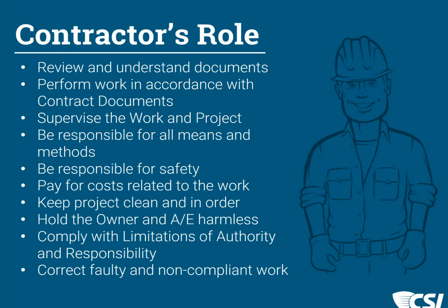And they are responsible for all the means and methods to implement the work, solely responsible for the sequences, the techniques, the procedures, and should they omit anything during that process, then they are responsible for those omissions, whether it's by the contract, by the contractor, by their employees, or by subcontractors that they may oversee.